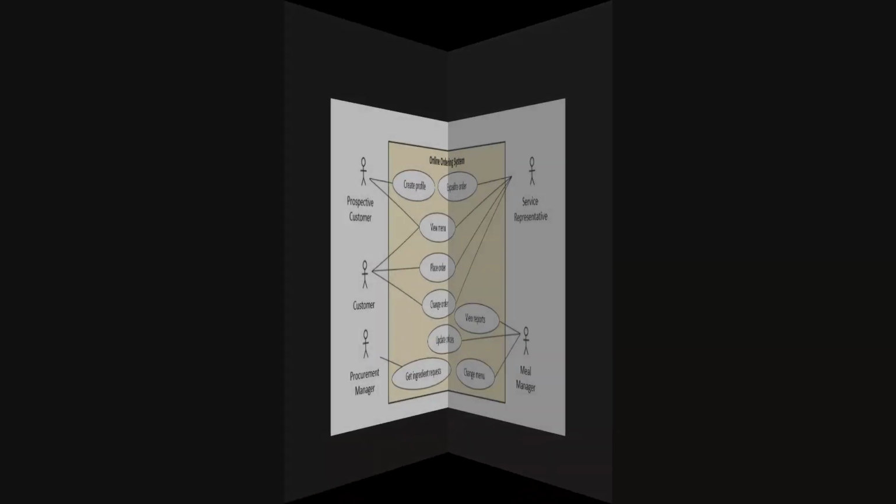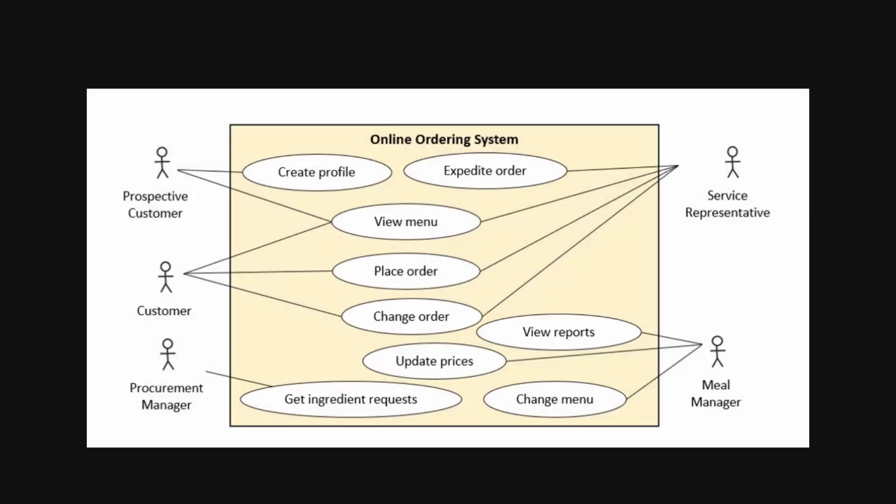So any type of a process map, and then you relate to that process map and link to it from specific requirements, user stories. You can create a business use case diagram, and that also gives you a way of breaking down your solution, and then perhaps your different themes will be linked to different business use cases, and your personas will be captured as the actors there. And then again, you can focus, for example, for 3 sprints, we are working on this one business use case.